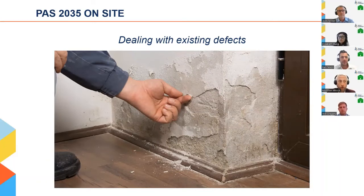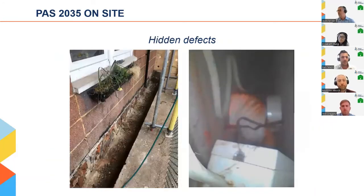This highlights the importance of early engagement of the retrofit assessor, under the stewardship of the retrofit coordinator, to survey and collect existing property data and commence a suitable level of defect diagnosis. This pre-works process is defined in the standard and requires a large amount of work up front. Like many a construction project, early efforts reap later rewards.